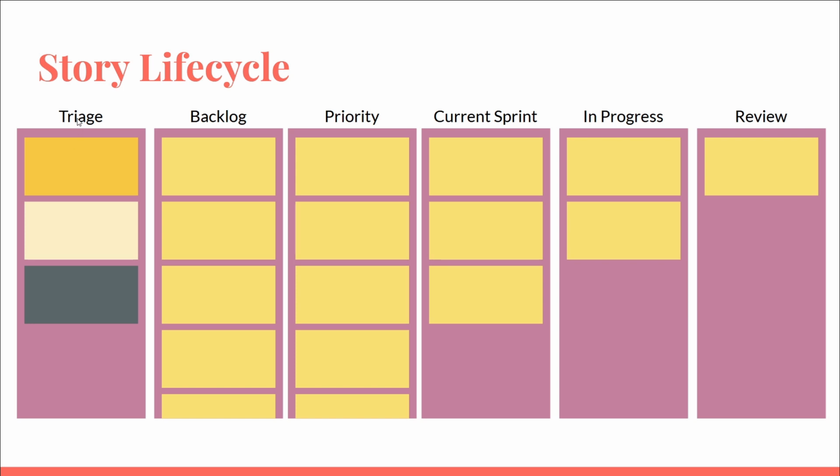And then we throw that into our triage lane. This is something where you don't need to think about it, you don't need to discuss it, you don't need to decide where it goes, you don't need to fill out the ticket entirely, you just write it down. It's kind of just a sticky note of, oh yeah, we need to talk about this as a team and figure out what we're going to do with this work. How do we want to prioritize that work? How do we want to organize it? So we throw things into this lane throughout the course of a week. And then the first day of a sprint, we go through and we do triage review.